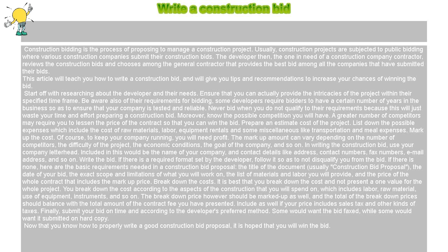The breakdown price, however, should be marked up as well, and the total of the breakdown prices should balance with the total amount of the contract fee you have presented. Include as well if your price includes sales tax and other kinds of taxes.